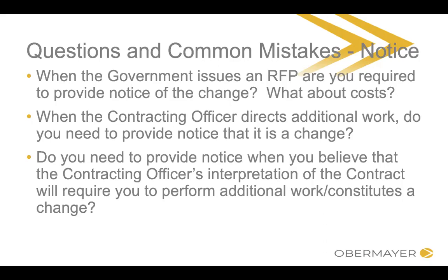They're issuing a modification. They're admitting it's a change. You don't need to give notice; you consider it a change. They already consider it a change. Everyone's on the same page. So no notice required either at the RFP stage, because there's no change yet. There's just a proposed, we're thinking about a change, or at an actual modification period, because everyone admits it's a